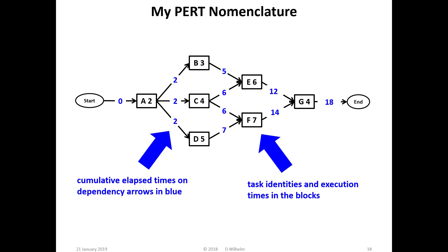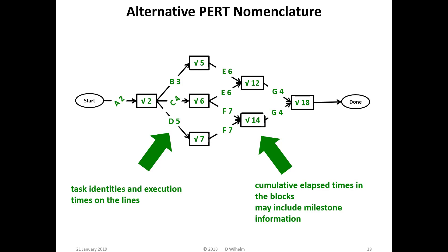There is at least one alternative nomenclature for PERT diagrams. My nomenclature uses the blocks for task identities and execution times and the arrows for the cumulative elapsed times as shown here. An alternative PERT nomenclature is to show milestones and elapsed times in the blocks and the task identities and execution times on the arrows.